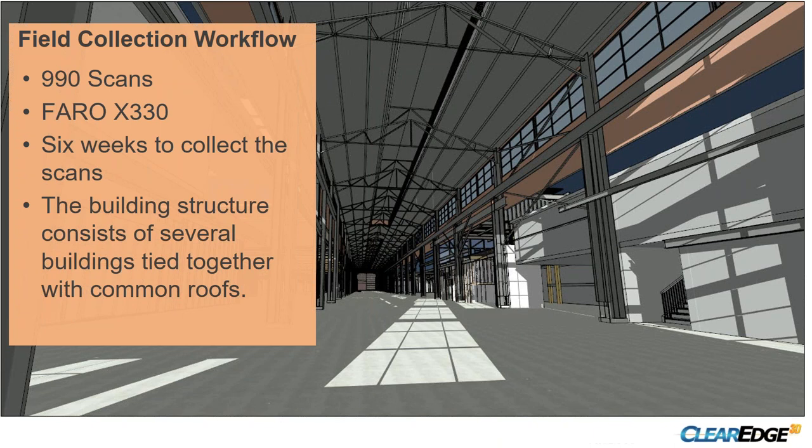And that's just because of the extra mud that's on there at the corners or at seams. And so people tend to overspec their accuracy and say, you know, we're going to provide this model at quarter inch accuracy when construction tolerances are way above that. So we try to quell the expectations there and say, if walls are inside of maybe an inch or so, we're going to keep them orthogonal and plumb. If we find something that's really out of whack that's going to affect your scope of work, we're going to red flag it and model it that way for you.